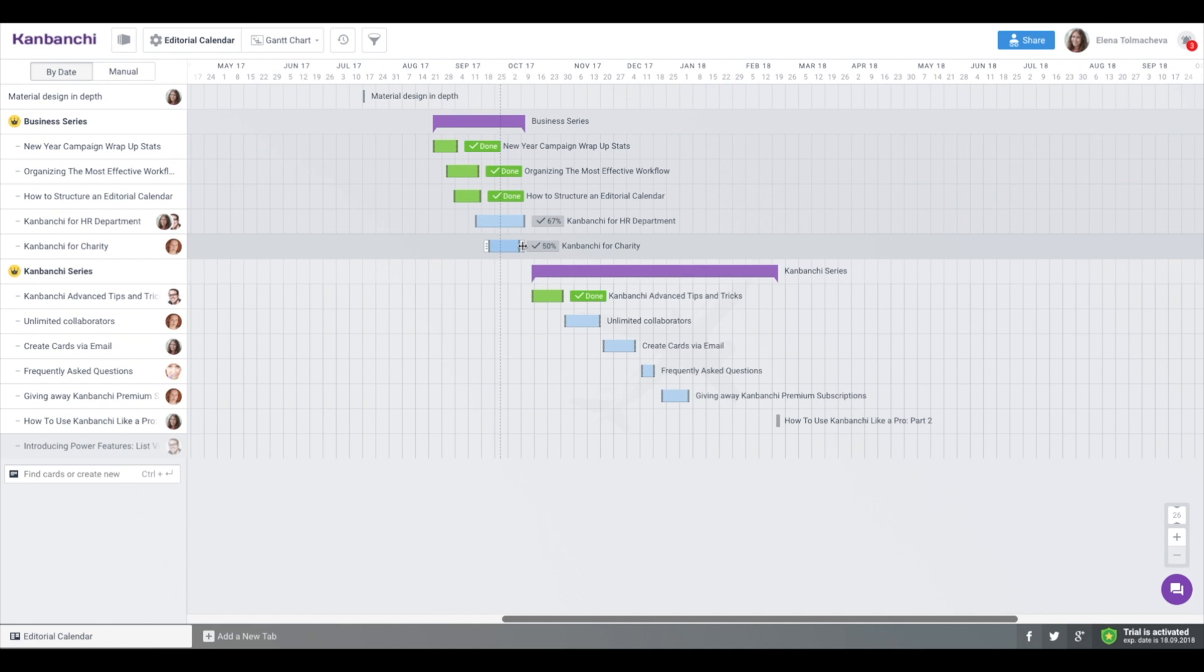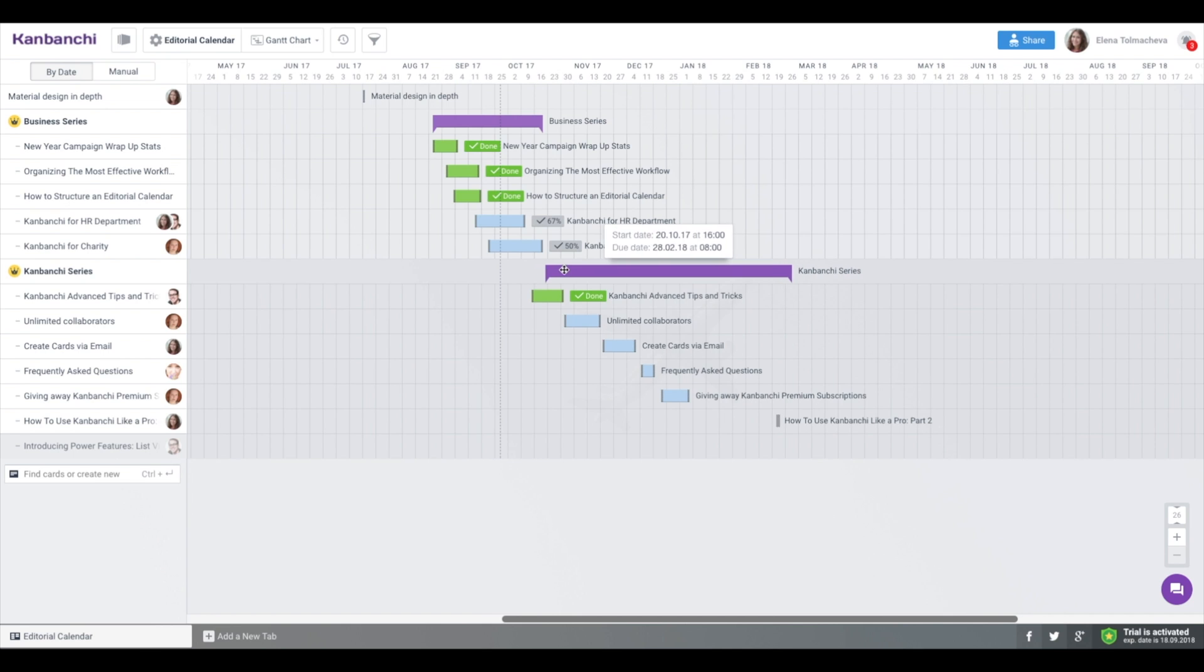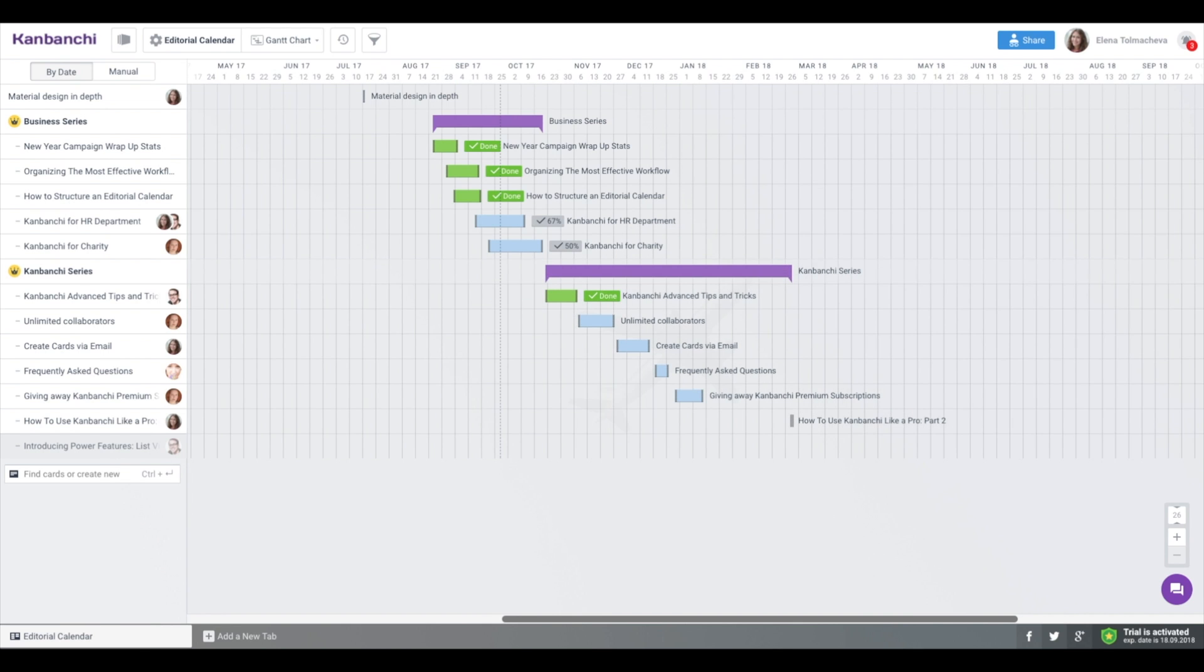When you add subcard dates, epic time frame changes. It's logical since epic can't be completed until its subcards are finished.